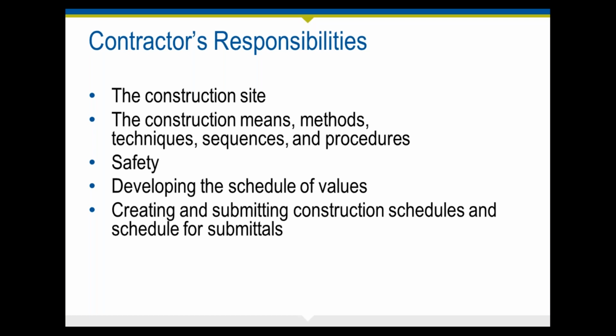They have to make sure that it is safe, that the means of egress and access are controlled. So if there's fencing that's required to prevent members of the public from accessing a live construction site, that is the contractor's responsibility. This responsibility stays with the contractor typically until substantial completion of the project. So that is a major part of the contractor's responsibility to maintain control of the construction site.